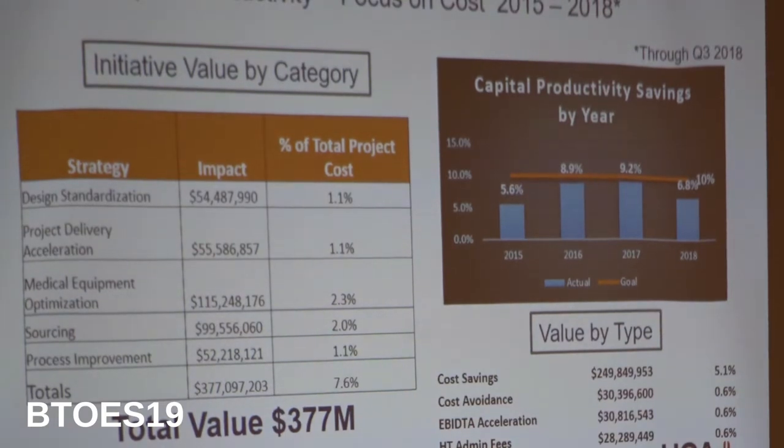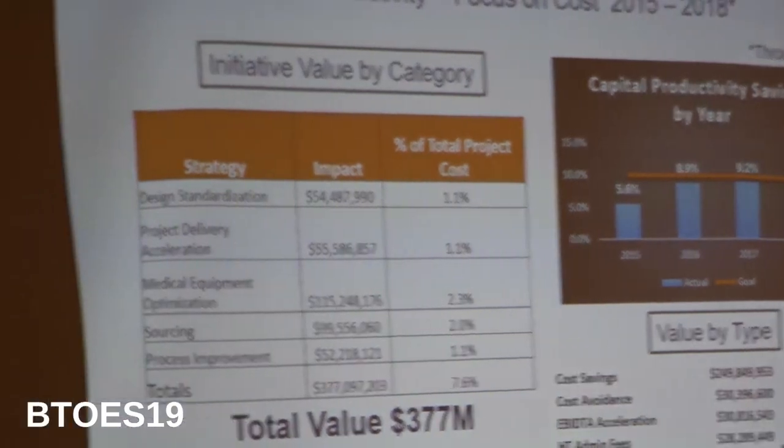I have a question. Sure. Do vendors have penalties built in if they don't meet milestones? No. The only thing we penalize for, or incent for, is the closeout. We close out meaning that you get all the bills in, all the documentation. But other than that, no.